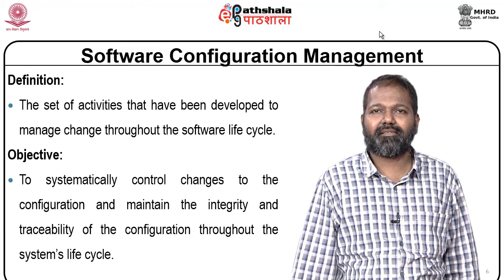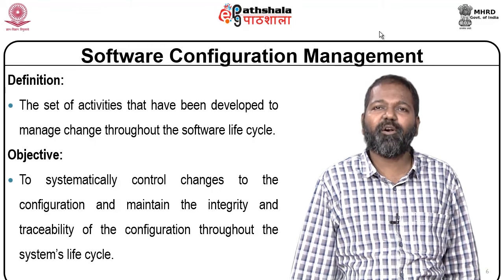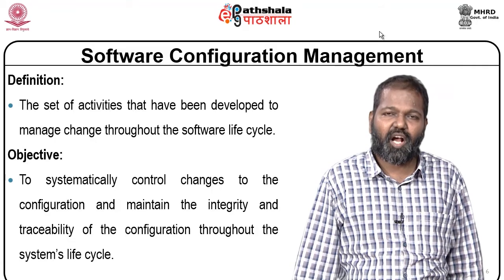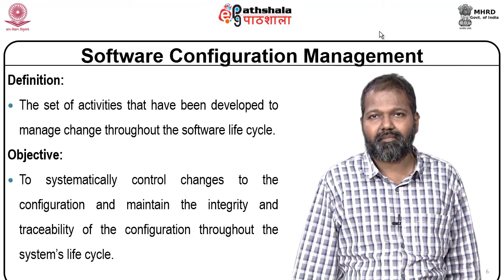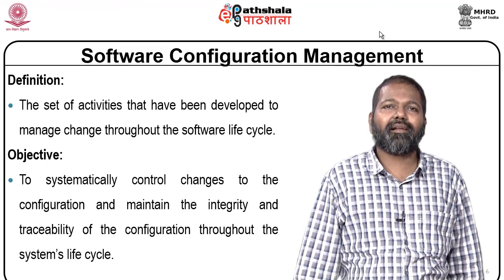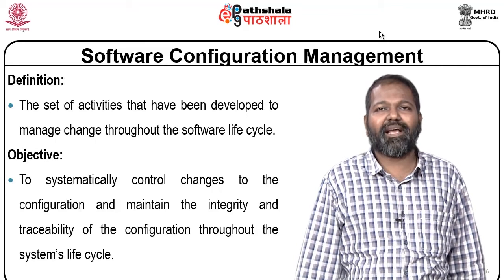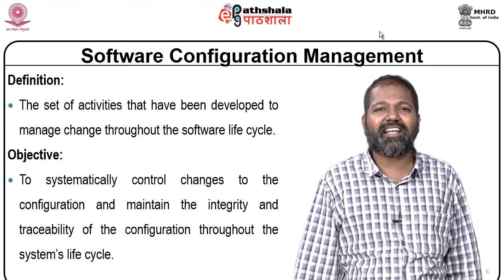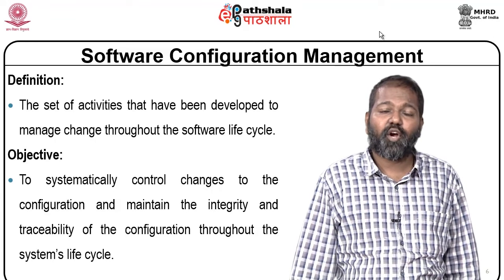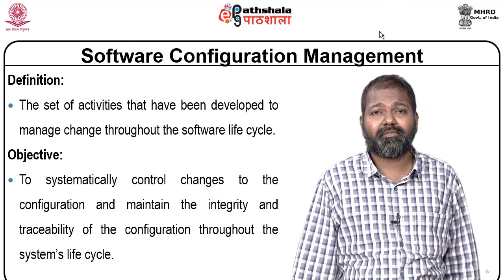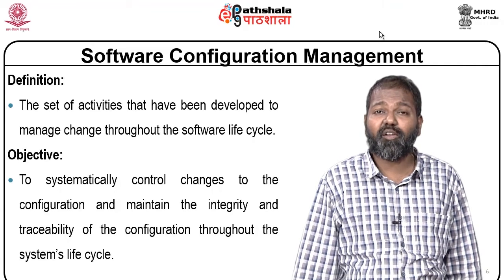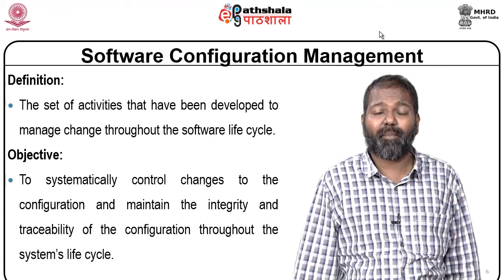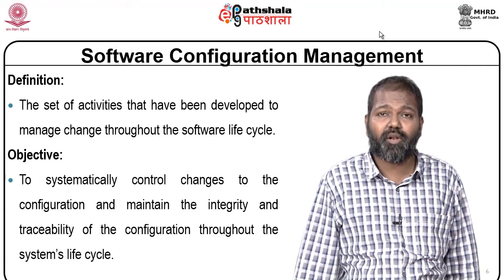if you want to address changing requirements, the cost increases. Similarly, when you are in coding phase, there is a change in requirement. When you address the changing requirement, not only the cost gets affected, the schedule also gets affected. Incorporating changing requirements sometimes may cause a schedule slippage.